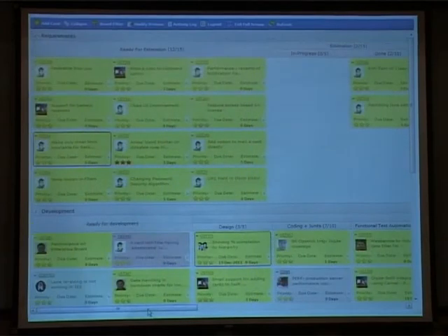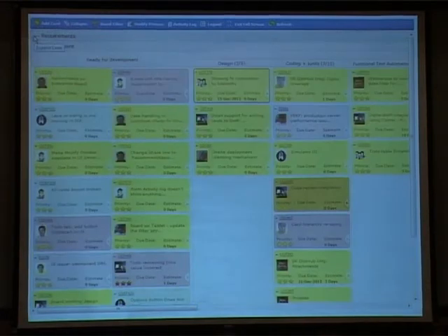So it helps you have different value streams for the different kinds of work that you are doing. With swim lanes, you could take an approach that I would like to have a different value stream for my user stories, a different value stream for my internal defects, and a different value stream for my customer defects. You could take an approach that I would like to have a different value stream based on my classes of service. For example, if I have an expedite ticket which has a high cost if it doesn't get delivered on time, I would like to have a separate value stream along with it. So the concept of swim lanes enables teams to map multiple value streams within the same project board, and as you can see, we have 4 value streams at any point of time within our current project.